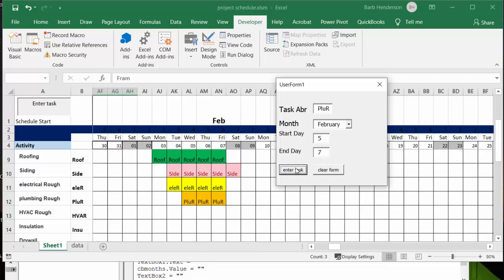Okay, and then I click the button enter task and the roughed in plumbing is going in here. So probably you need to have that done before you do your roughed in HVAC which is the heating and air conditioning.